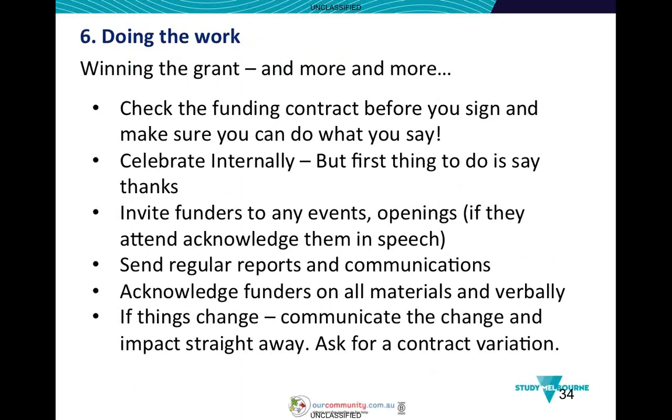One important thing I want to point out here is that you do have a final report and acquittal, and the work on the final report and acquittal does not start at the end of the project. It starts now. As soon as you've been told that you are successful, you need to start making sure that you document records ready to do that final report. So keep all of those documents, keep examples of marketing and promotion, for example, that you may do. Inviting the funders, acknowledging the funders. There are, of course, branding guidelines, so make sure that you're aware of those.